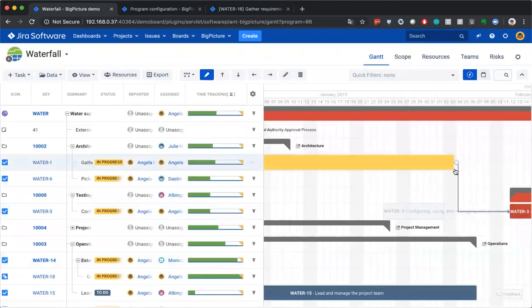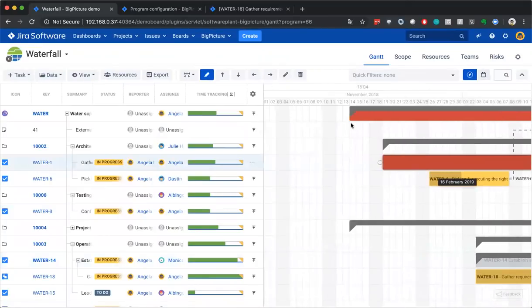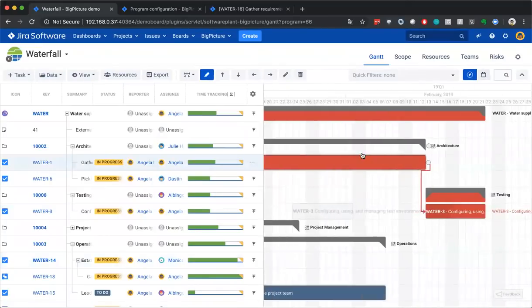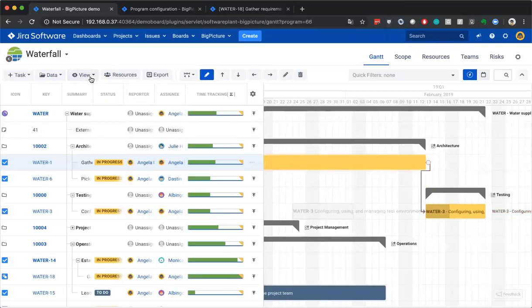If you combine it with dependencies, you can actually generate a critical path. The only thing you need is 2 tickets which are linked together, finish to start, and there is no lag time between them. In such situations, both of the tickets will be on the critical path.